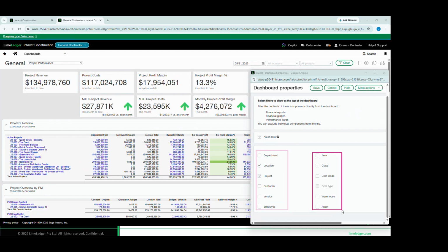In my case here, I have a dimension for my project, and within the project, I also have dimensions for cost code and cost type. So what I'm able to do now is create a P&L report by project, create a project spend report by cost code or cost type, and start to get that really granular analytics.